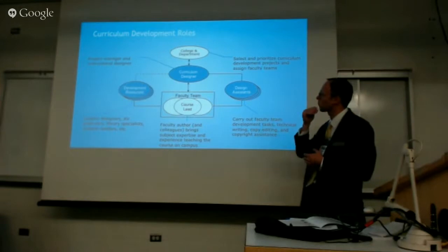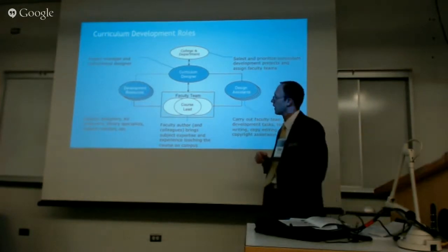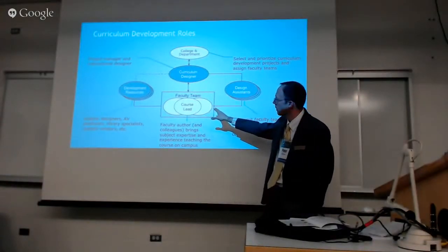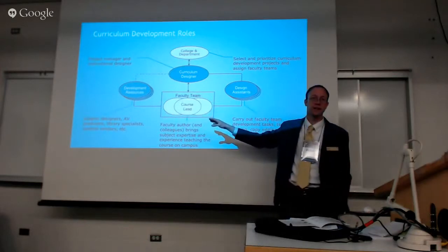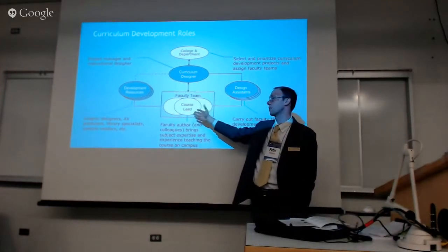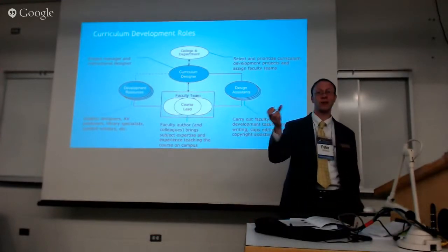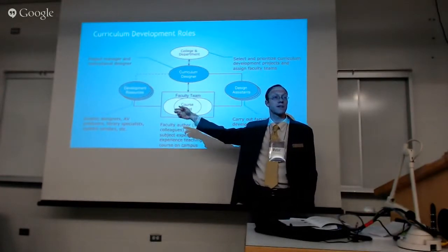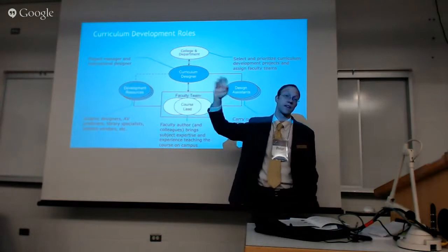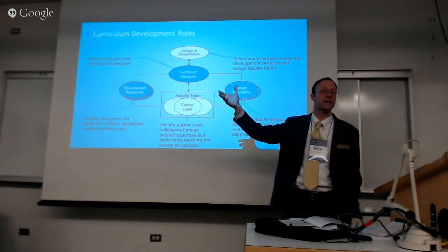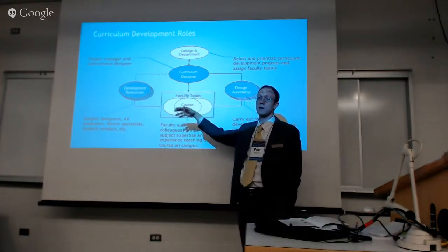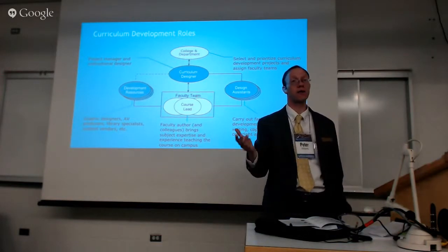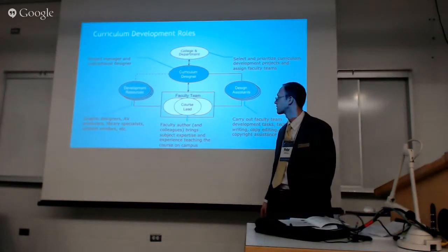Something that was brought up briefly in the video is that we work with this course lead and the designer together. I can't remember if it mentioned, though, that oftentimes there are others in the process that are involved as we develop. The faculty, for example, in a foundations course, where we're blending together several different disciplines, would ideally have a colleague or two participating in that process. Usually the course lead would have like 9 hours a week or something as a leave to develop the course. And these other faculty members would be in more of a consulting role where they're just spending an hour here or there reviewing some content or giving feedback or helping to brainstorm, those sorts of things.